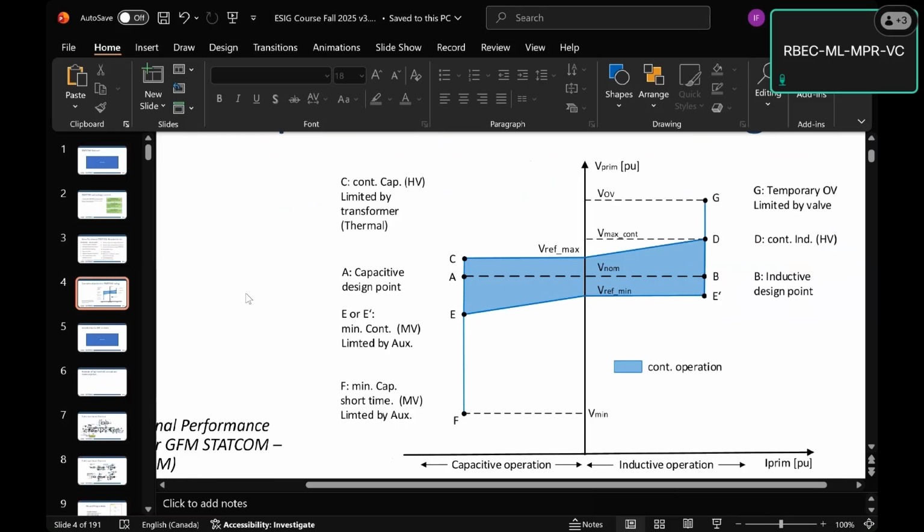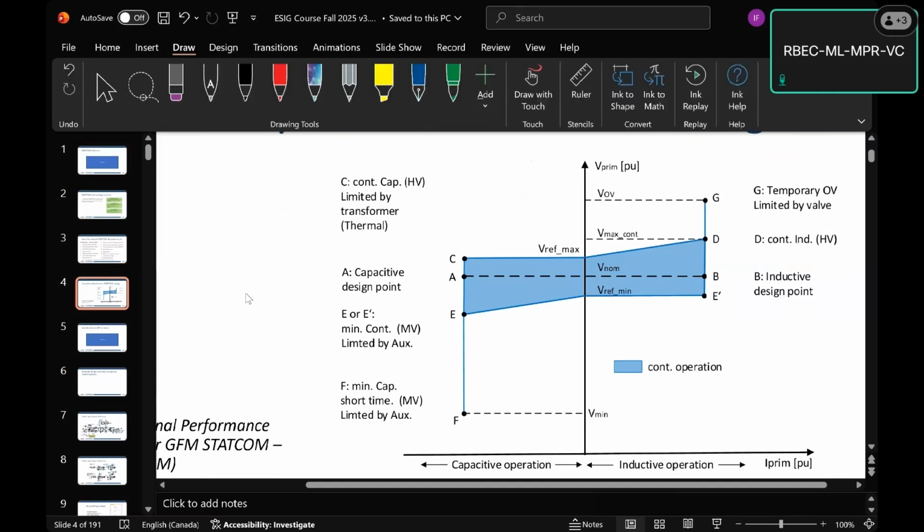How much do they cost? Why wouldn't you use them all over the place is a great question. They're actually wonderful devices, but they're not cheap devices. Usually they're owned by transmission companies because they're solving a transmission problem. They take between 2 and 4 years to procure. Did you have something you wanted to add on that? I was just going to also add that as they get bigger, they get much, much more expensive. So what's the average size for these STATCOMs these days? Yeah. Let's go back to the old days.